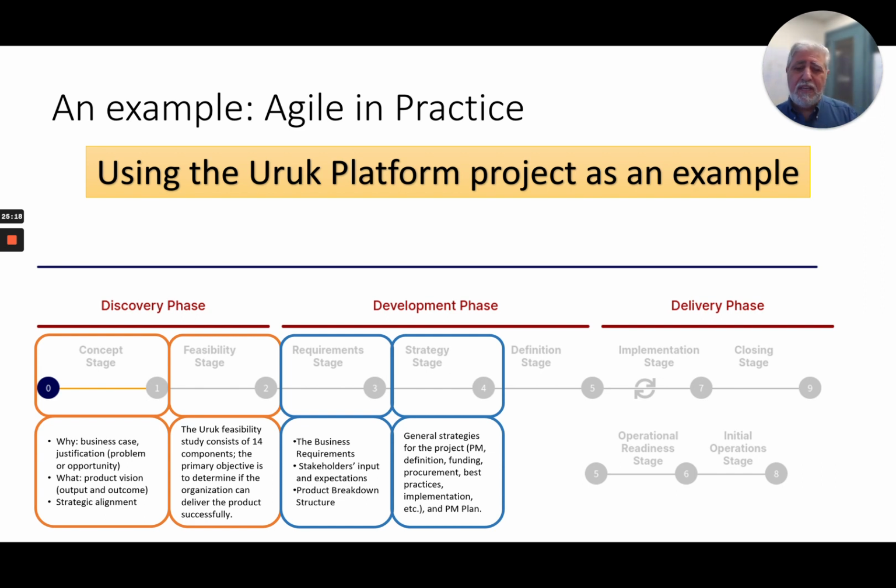No, because if you think about it, in terms of a timeline, this work would probably have taken 6 months, a year, a few months, whatever the case might be. However, in terms of money, we are not really spending much because we're still on paper, right? Most of the money comes in implementation, where we need to hire, we need a development team, a lot of work to be done, we need offices, and many other things. So that is where the real costs are.